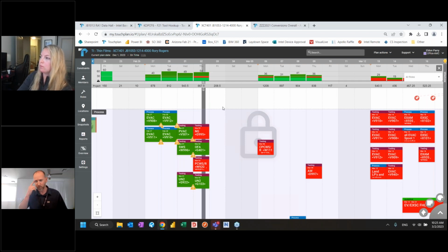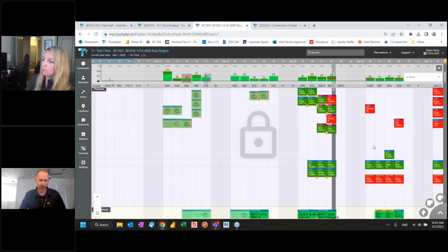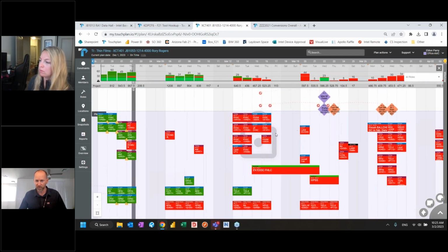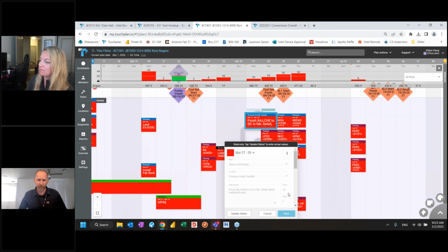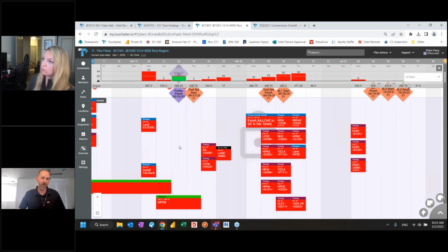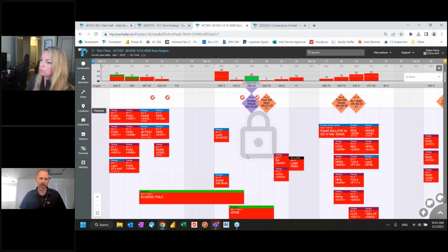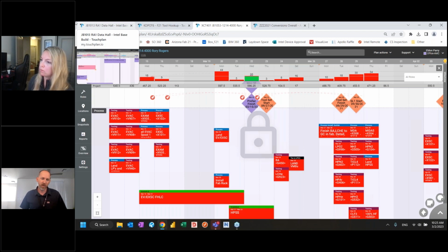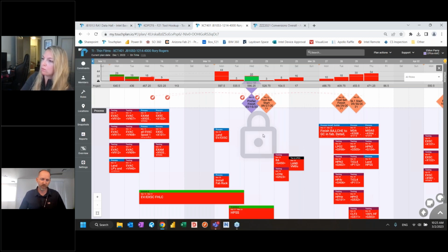They still look at a duration, so to maybe answer the back half of that question, let me see if I can find one on here that's done right. Our foreman and general foreman do often fill these out, so I can't promise it's always 100%. So this would be a 20-hour task that he broke up into two 10-hour days. That's how we handle the duration. They still look at things in a duration perspective of how many days they think it's going to take, and then they couple that with how many hours they expect to allocate to that duration, and then we just do the math to spread it. So if it's 20 hours over 2 days, and we put 10 hours on the crew side, we know it's 10 hours a day. Hopefully that answers the question.